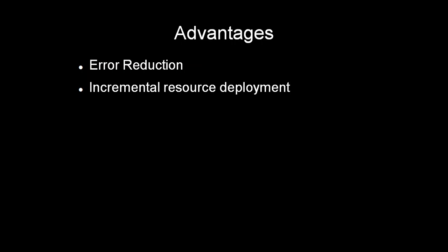Incremental resource deployment is there for the companies also. The software companies, or the organization, need not spend a large amount of money for the whole resources and manpower because initially we will be working on only a small version of the software. So we require only a small team and only a small amount of resources for the software development. Later on, we can add development members to the software. So incremental resource deployment is there for the customer as well as for the organization. So these are the two advantages of the incremental development model.